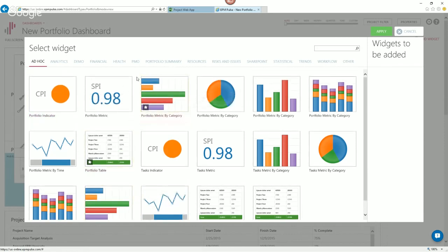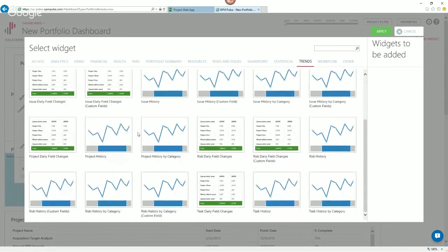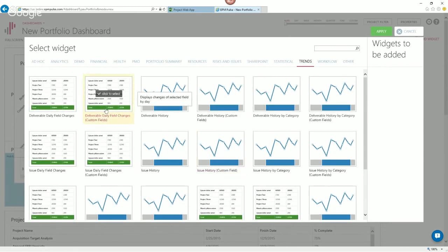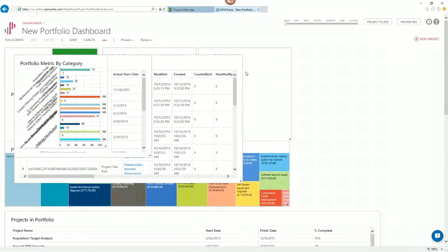As part of the FluentPro PMO, what we provide all the users is also the trending widgets. Every time we synchronize data, we take a snapshot of all your data. So you can really build all the trending charts and add them to the dashboard. How the value of a specific field changed, how my project cost changed over time, how my number of tasks changed over time. All that information, how the status, some overall status changed over time for my projects. It's all part of the standard package that is available immediately out of the box.